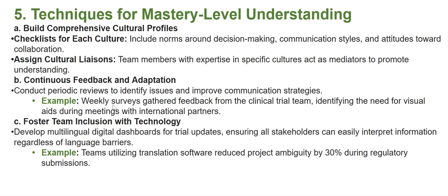As for example, weekly surveys gather feedback from the clinical trial team, identifying the need for visual aids during meetings with international partners. Foster team inclusion with technology. Develop multilingual digital dashboards for trial updates, ensuring all stakeholders can easily interpret information regardless of language barriers. As for example, teams utilizing translation software reduced project ambiguity by 30% during regulatory submissions.